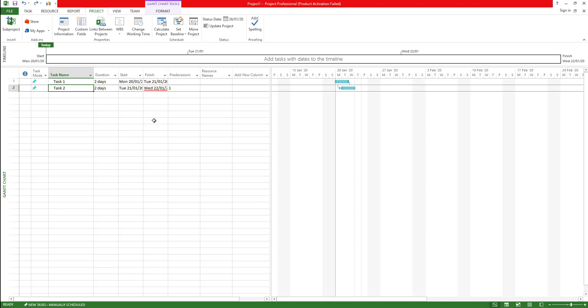With the WBS what happens is you actually create a sort of unique code for each of those tasks so you can actually identify it. Whenever you send an email you can include that code in the project statement or in the email subject so people can understand which exactly the task that you're referring to.